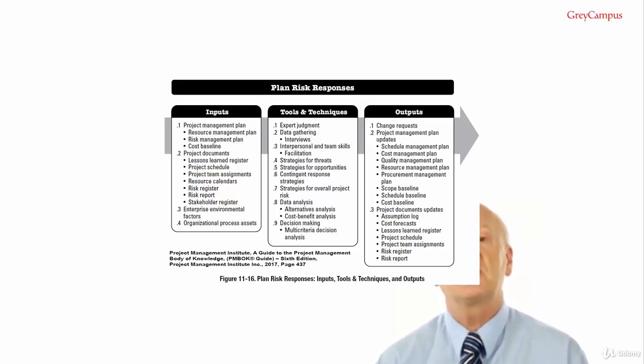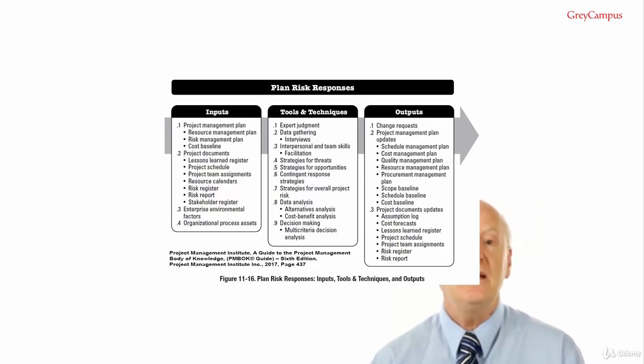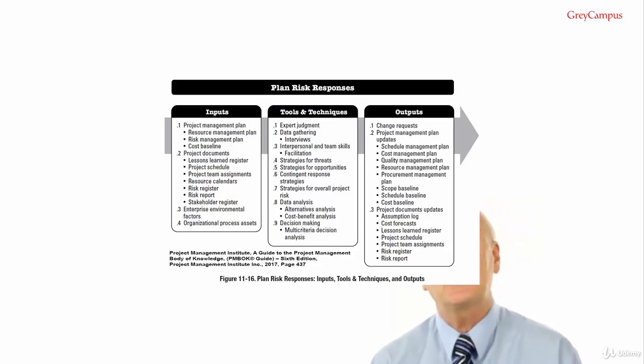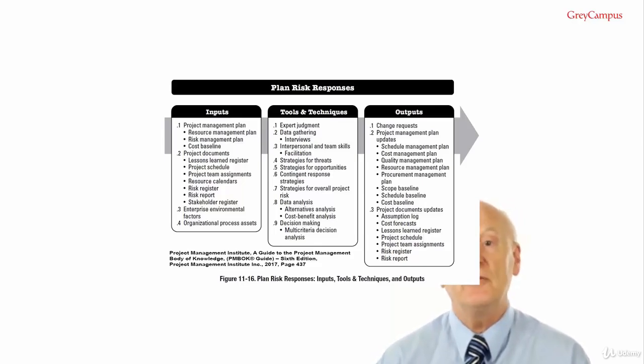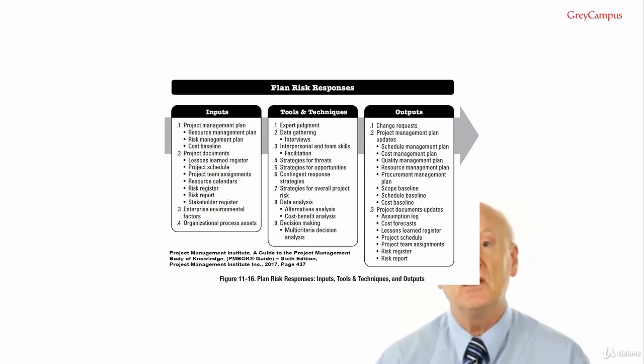Early mitigation action is often more effective than trying to repair the damage after the threat has occurred. Examples of mitigation include adopting less complex processes, conducting more tests, choosing a more stable seller, developing a prototype to test and perfect before committing to a full-scale product. Another method is to design redundancy into a product. For example, a computer is critical on a spacecraft, and so you can build in extra computers which will automatically take over if one fails.